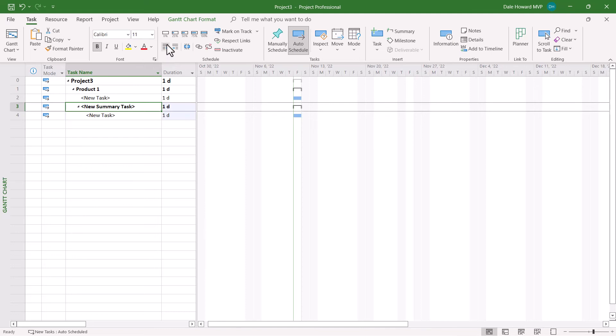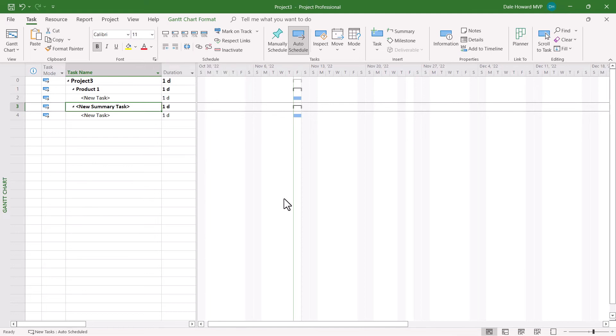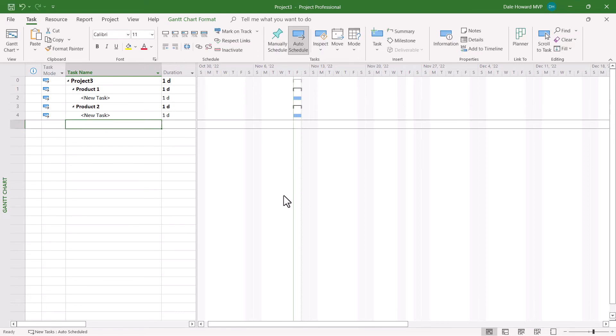To do that, all I need to do is to click the Out-dent Task button in the task ribbon. Then I can give it the name Product 2.